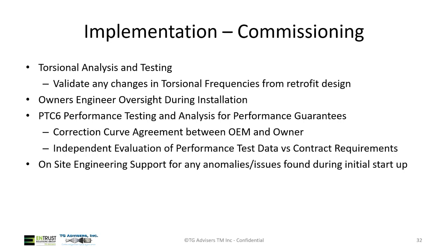You're typically going to get involved in some kind of formal performance test, whether it's PTC6 or otherwise, whatever's negotiated up front with the OEM, to dictate and say, hey, was this performance guarantee met? Was this project meeting the goals that we agreed to?